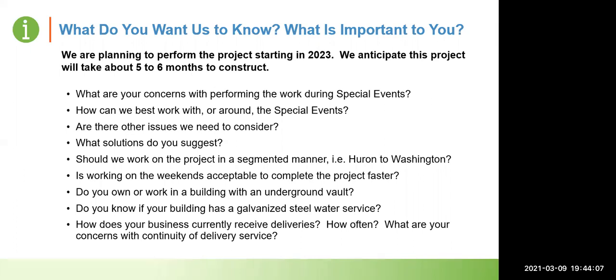As far as the weekends go, from a retailer standpoint, most of the restaurants and retailers do most of their business Friday, Saturday, and Sunday. So working on the weekends would really interrupt our business flow. You'd actually be better doing longer days on a Monday or Tuesday, when it's the quietest time of the week for many of the businesses downtown. That's just from a business perspective.